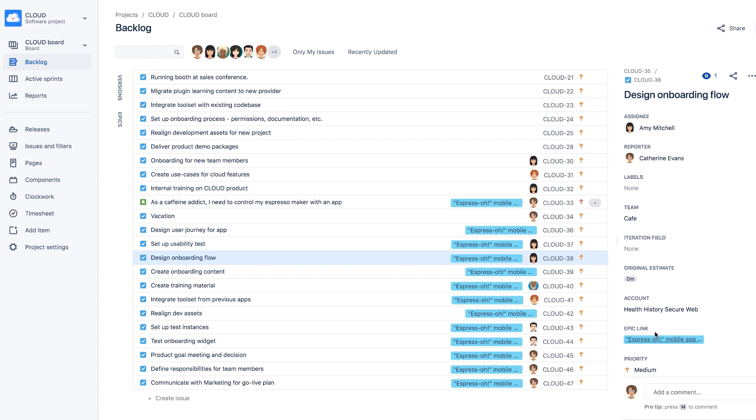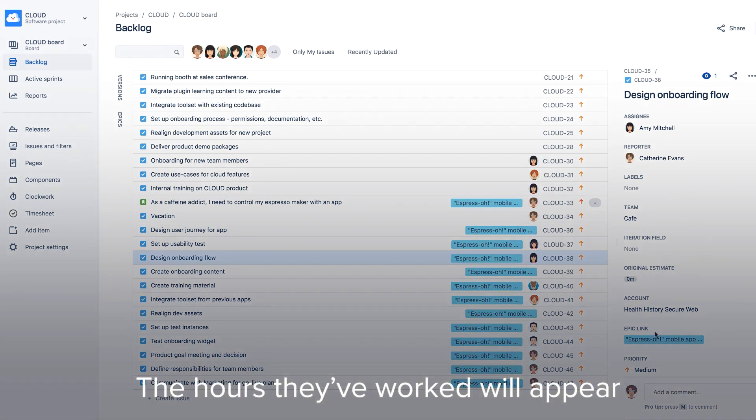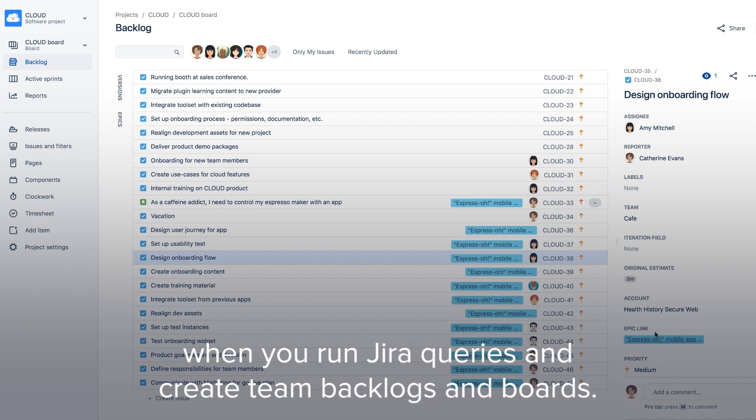Next time your team members log time on their issues with Tempo timesheets, the hours they've worked will appear when you run Jira queries and create team backlogs and boards.